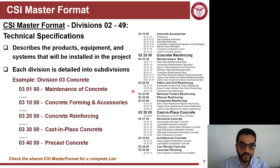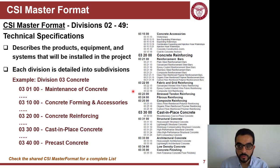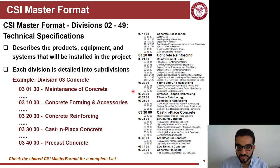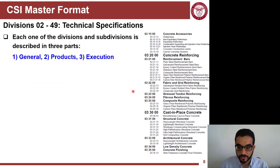Another way the CSI Master Format is used is for cost control. When you report your costs — labor, material, and equipment — the cost codes people use typically follow what is recommended by the CSI Master Format. So it's not only for standardizing specification communication; it's also about standardizing how you track costs and collect cost data.